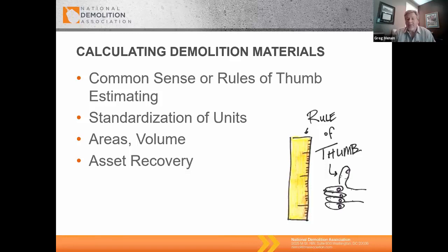A lot of times, we have the discussion, we talk about the concrete, and I love this one because everybody goes through and we talk about the actual size of the concrete. We have the drawings and we're looking at a foundation, and it says it's 3 foot by 3 foot by 2 foot deep. And then by the time the job is done, your estimate and your calculations went over by 10%, 15%, or 20%. Given that it's a large job, you're trying to figure out why it costs so much more.